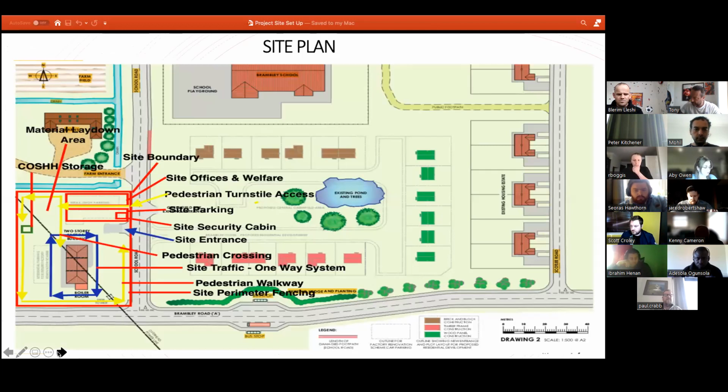A little bit of a brief overview of the project for those that are not aware. The scope of our works is the renovation of an old 1900s factory building, along with the conversion and fitting out of 3 separate shops with flats on the second story. There are some points to note with some work that's previously been undertaken, which is the roof has already been renovated. The external brickwork has already been pointed. There's asbestos in the boiler room, which has already been removed, and the parking has already been developed. And we want to pay some special considerations to a local school and a farm.